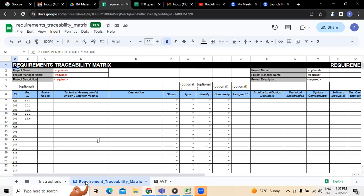What requirements we have taken and what must be the expected result? Because there are two different things. One is expected result and the second is actual result. Expected result is what the customer is expecting; actual result is what we are developing. Being a business analyst, one should be in a position to understand the requirements well in advance, and we should have a responsibility to trace the requirements between use cases and test cases. This requirement traceability matrix is what we normally do in the initial stages of the project — whenever we start the project, the testing team will also be included.